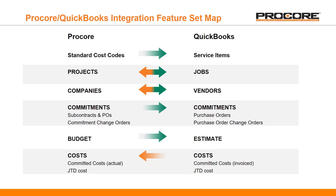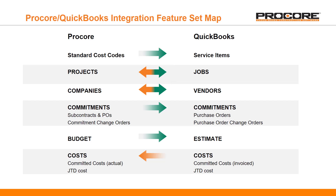Once your standard cost codes are synced, you can start exporting any new projects you create in Procore to QuickBooks. This creates the job record in QuickBooks and syncs it with the project in Procore. You may notice that this row has arrows going in both directions, meaning you are also able to import jobs that you may have set up in QuickBooks, creating new Procore projects based on the job data in QuickBooks.